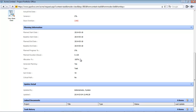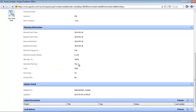This can also be shown and imported from Microsoft Project. The next field is the 'Generate Planning' field. This field indicates whether a task must be taken into account for resource planning. Tasks that are not assigned to any employees will not be taken into account for planning calculations. Task types like project tasks, summary tasks, milestones, or deliverables will by default not show as true on the 'Generate Planning' field. Tasks where the task type is 'Task' will by default show as true. This field will also show when you import your project schedules.